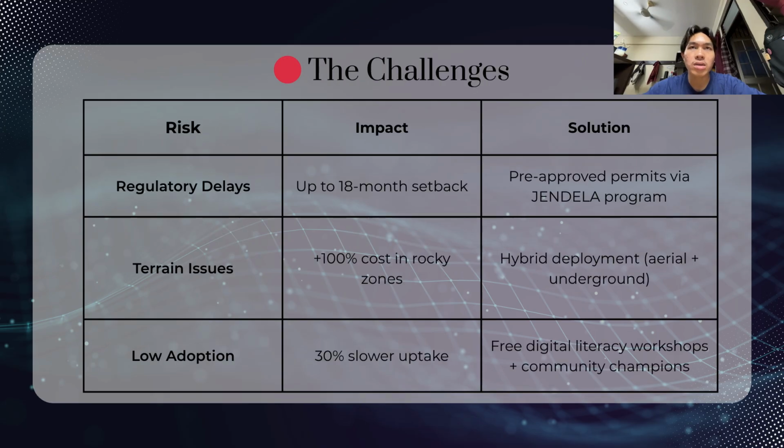The challenges are regulatory delay of up to 18 months, terrain issues with 100% cost increase in rocky land, and low adoption, with 30% slower uptake. That's all from me.